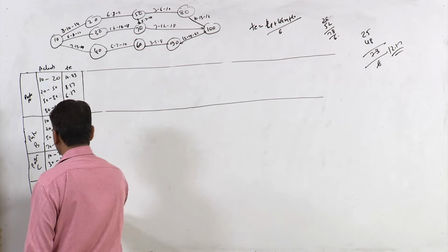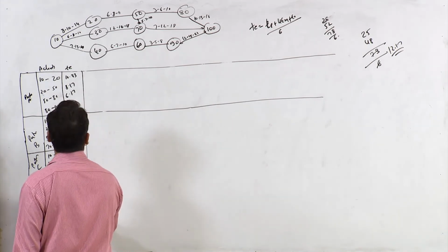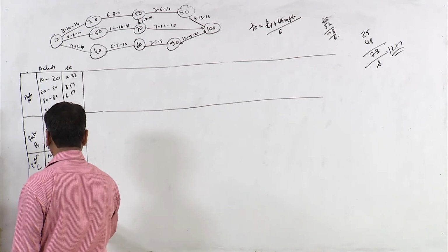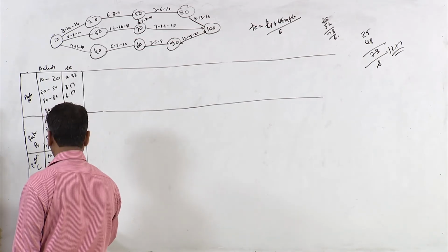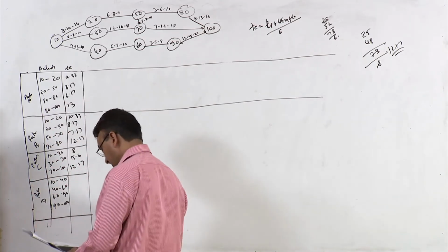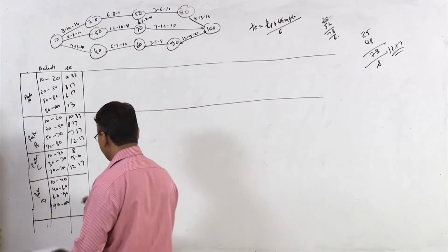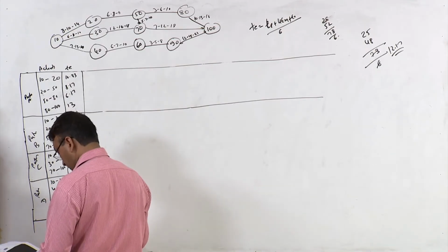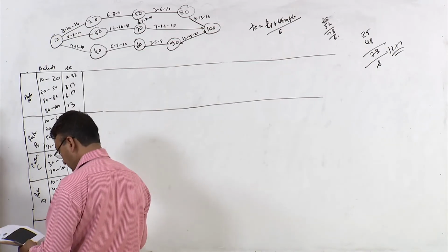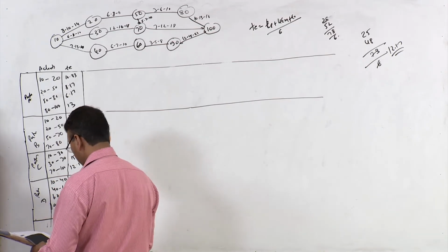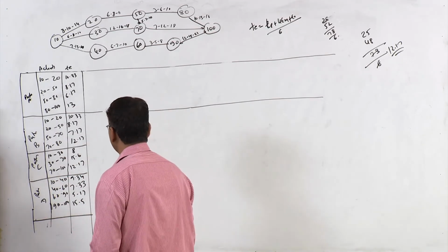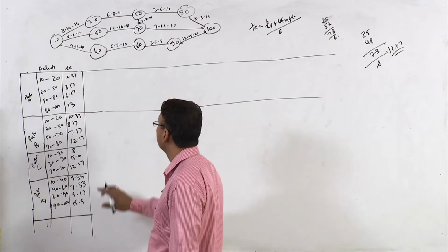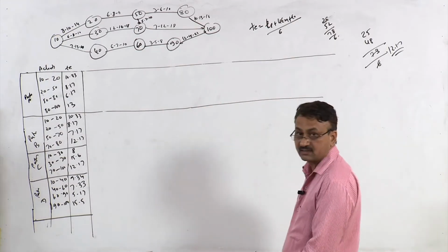Path D is 10 to 40, 40 to 60, 60 to 90 and 90 to 100, right. There are 4 activities along this path, and the time durations are 9.34, then you got 7.33, 5.17 and 15.5, right. Now we have calculated all TEs for all these activities.